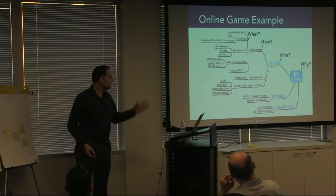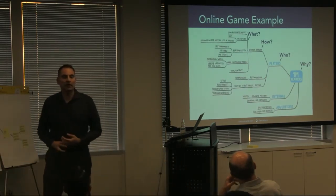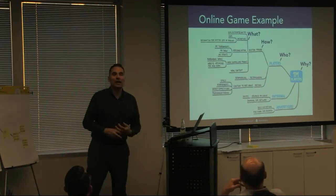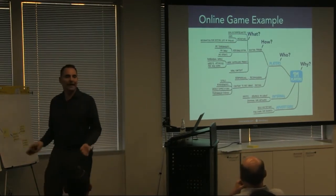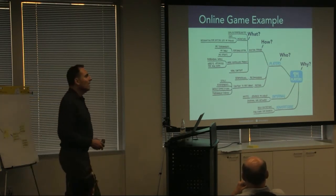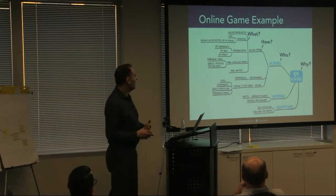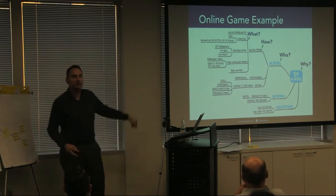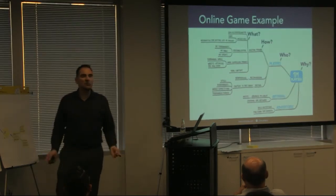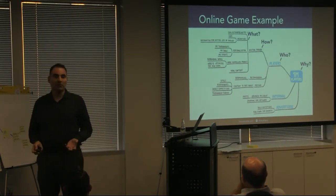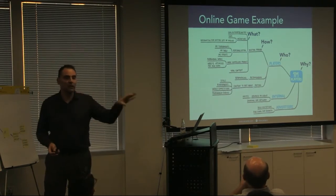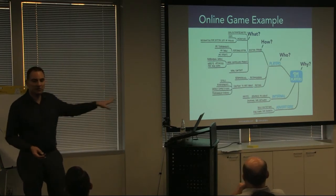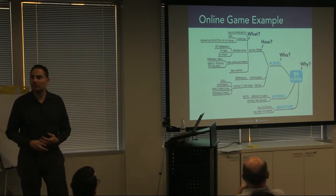Here's an example from the book. The map is flipped around with the WHY on the right side. This example is about an online gaming system and the goal is to get to one million players. There are different actors who can help with that, and the branch for players is fleshed out a lot more than the rest — which aligns with the Agile idea of progressive elaboration. We put more work and detail into the areas of the map we're going to deal with first.